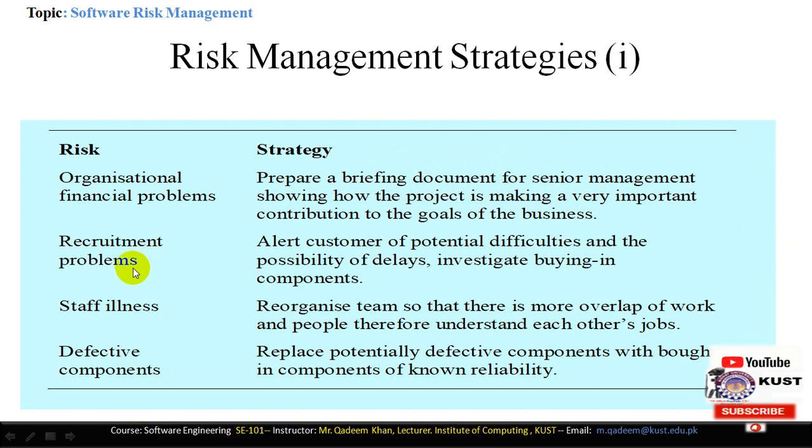Next is the recruitment problems. For example, a skilled person is very difficult to identify in the market, or we are unable to hire skillful people. Then the recruitment problems may occur. So alert the customer of the potential difficulties.